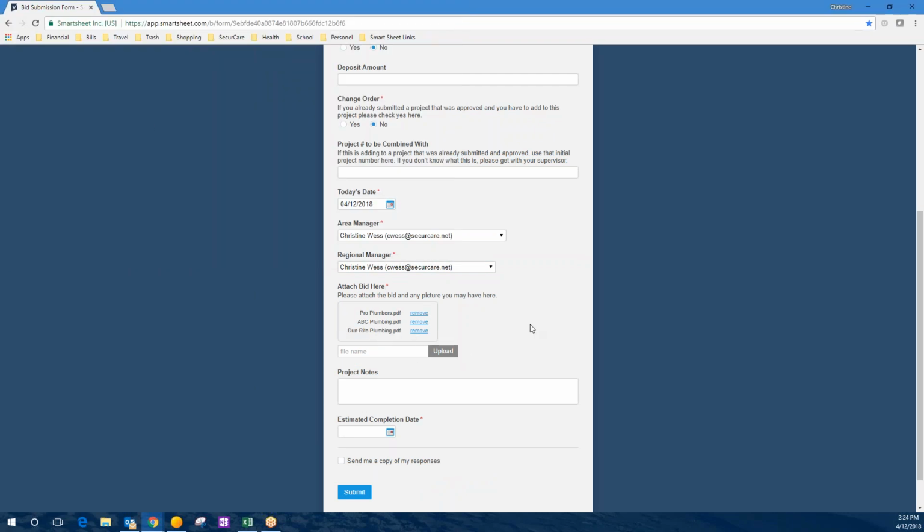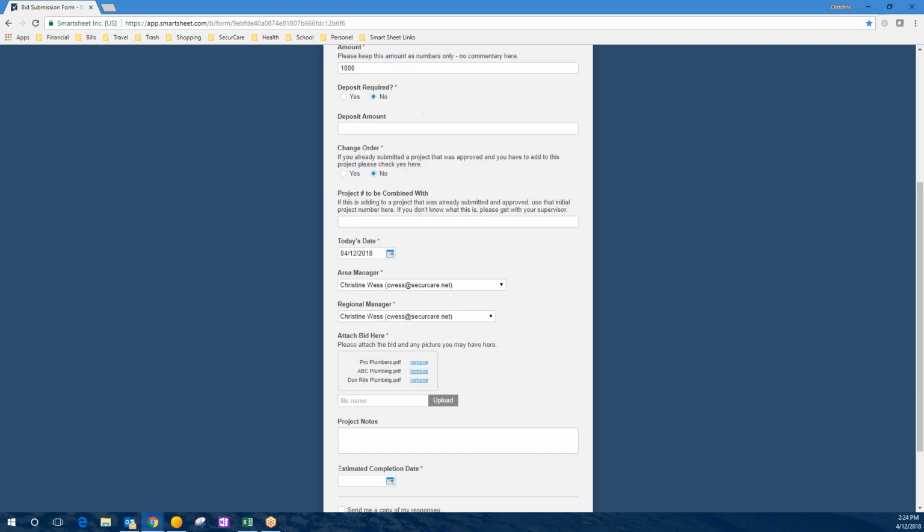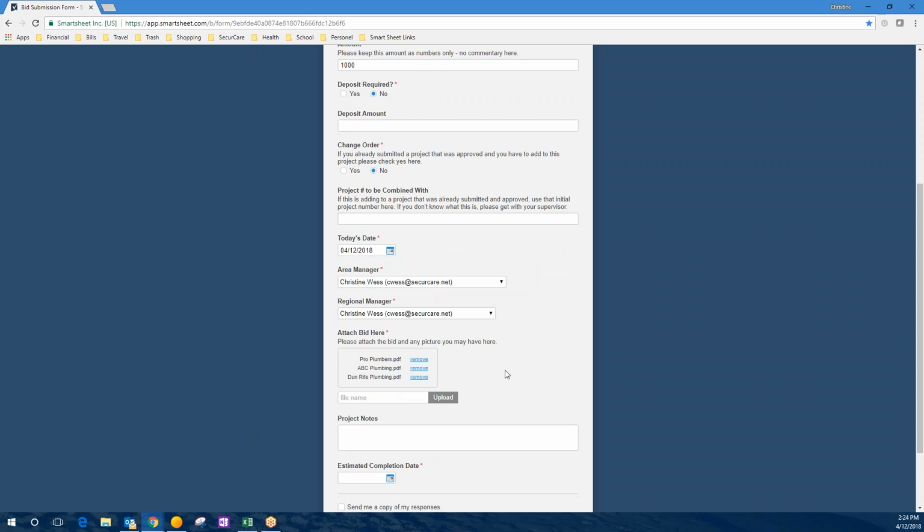So when this gets sent off and submitted, depending on what that amount is, it will go to the correct approver and their approval level. And so let's say this gets kicked to me and I want to take a look at all the different bids. Well, they're all right here. And I know that you want to go with ABC Plumbing because you put that in the vendor name and in the amount. So I'll know that ABC Plumbing is the one you want.